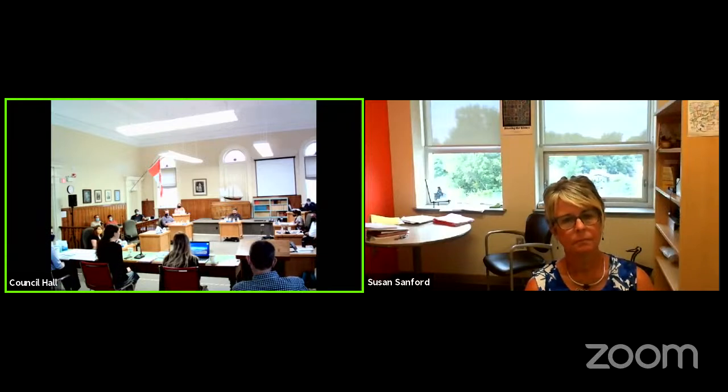There would be more federal involvement because they administer the seafloor, or the harbor bottom, in that area, whereas option 3 would be contained within a water lot, which would not need federal approval from the same administrative agencies. In terms of relationships with neighboring municipalities, I think there are definitely opportunities for both municipalities to benefit from this work. And so that could help to smooth the process and make it something that both of them can embrace.